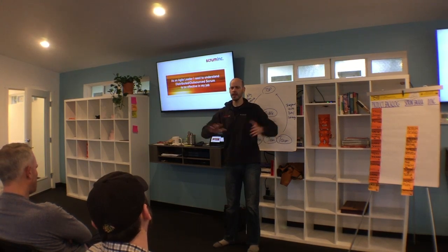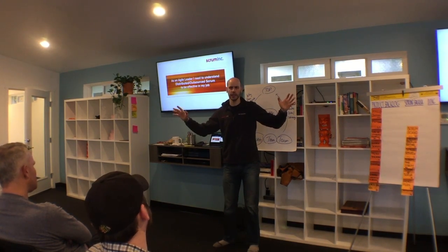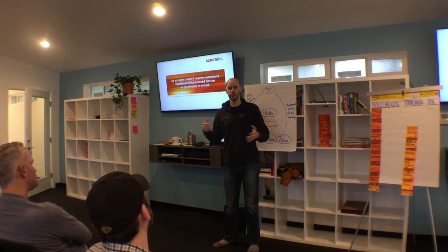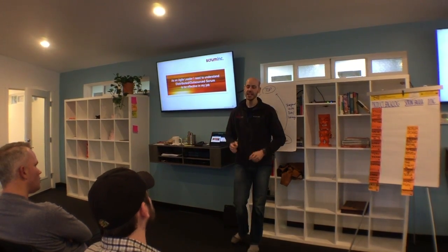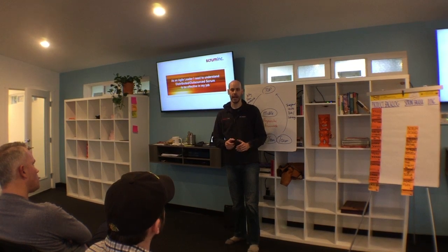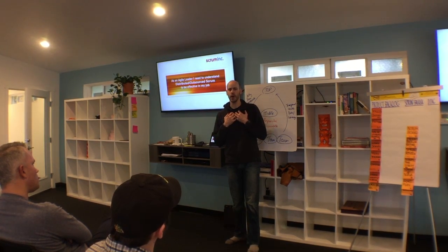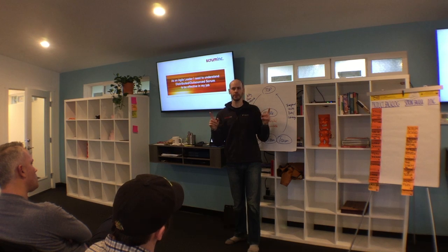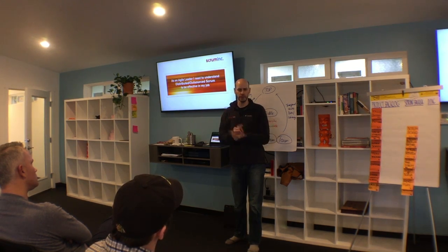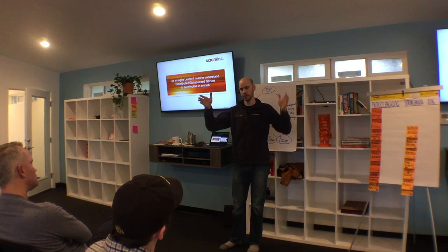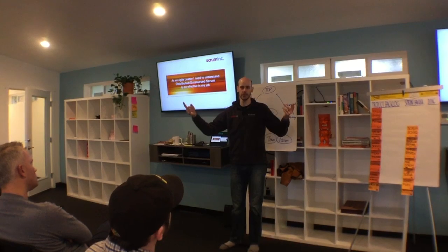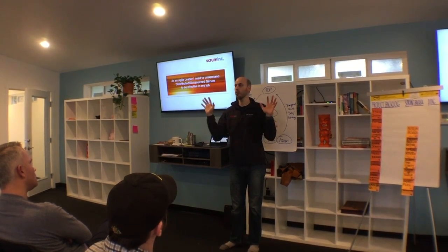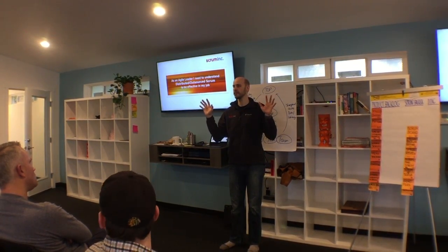So I've run into a lot of problems. I used to say, teams do what they want. That's agile, right? And whatever scale fits them. And we had real trouble releasing. They could work independently, but when it came to actually delivering product, it was a problem. So the last few years, I've mandated, which I always feel wary of when I say that, so I'm interested in other opinions or other evidence. But I've been mandating, and so has all of Scrum Inc., that teams all start and end on the same sprint cadence once the second Scrum team starts in the organization. For that reason. I'm open to finding a more agile way. I just haven't seen it in the last few years.